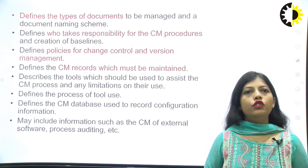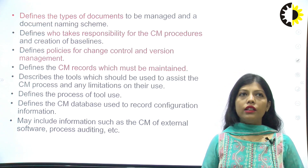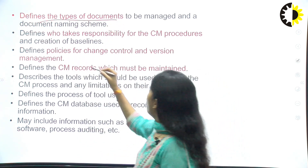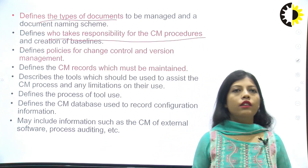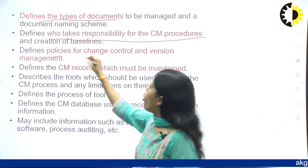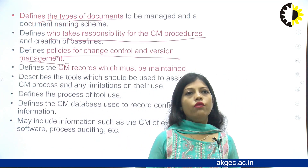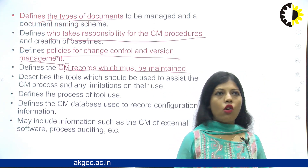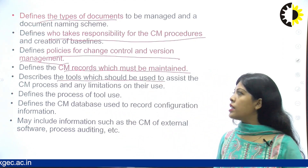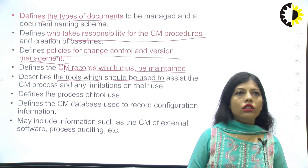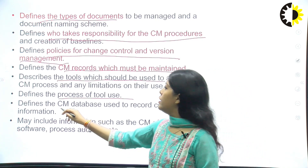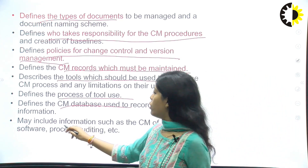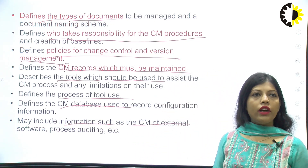During SCM planning, we define the types of documents to be managed and the document naming scheme. We define who takes responsibility for configuration management procedures and their creation. We define policies for change control and version management, define CM records which must be maintained, describe the tools to assist in the CM process and limitations on their use, define the process of tool use, and define the CM database in which configuration information is maintained. It may also include information such as CM of external software processes, auditing, etc.